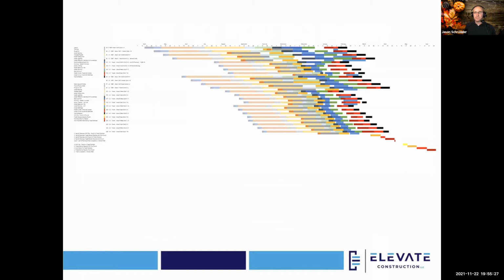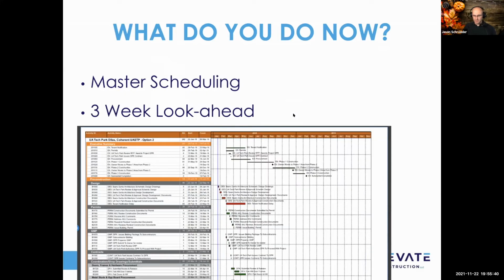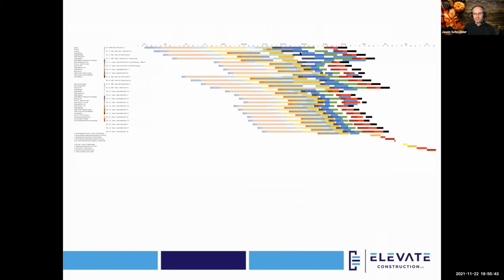And that produces this. This image right here is a CPM schedule that was filtered out with a flow analysis. And this flow analysis shows by color trades. So there's an attempt at flow, a little bit over here. Ooh, where did I go? Somebody's messing with my screen. Okay. And then you see the blue, it goes forward, back, down, forward, back, over, back, down, straight down, back, over, forward. There's no trade flow in this schedule. And this is why projects in construction crash land: they create a critical path when the people start faking the logic and they start stacking work at the end, and it's impossible to accomplish and we're screwed.